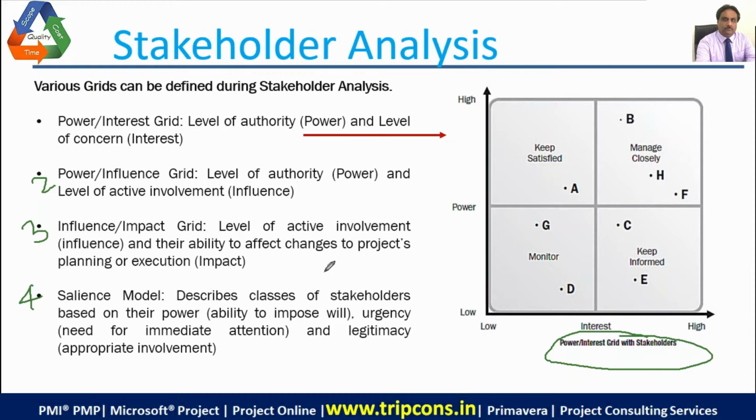Okay, the ones having high power and low interest, you just have to keep them satisfied by handling any requirement that they make from time to time. If someone from the monitor group calls you for immediate and urgent attention, you should understand that you are not supposed to apply too much time here, so you can cut it short and move on.